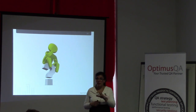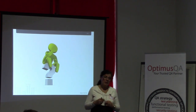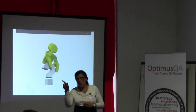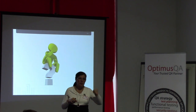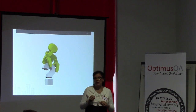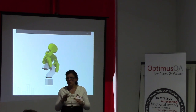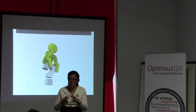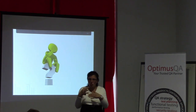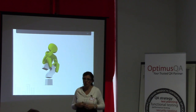But if you do it that way, at least you have some facts, right? And then we sit together, and he's like, well, I know this project, we're going to move it a little bit, and it won't be as high demand, and don't worry about this one right now. Maybe they ask for 100 hours, but you can assign only 50. We're just starting, so they can at least go to sprint meetings and start doing something, but not the full work. So we're trying to manage.